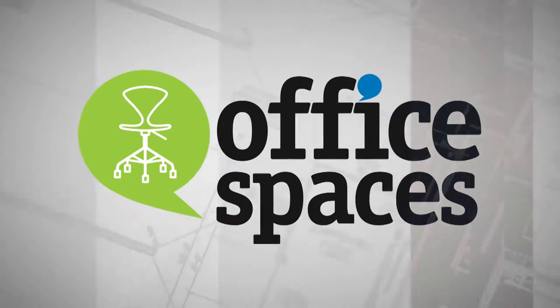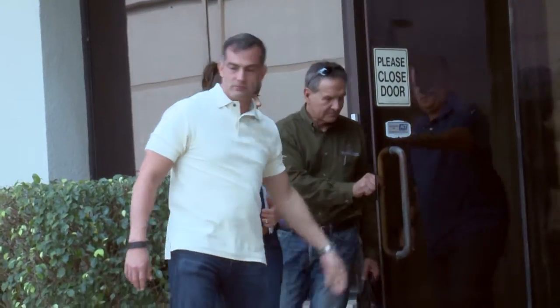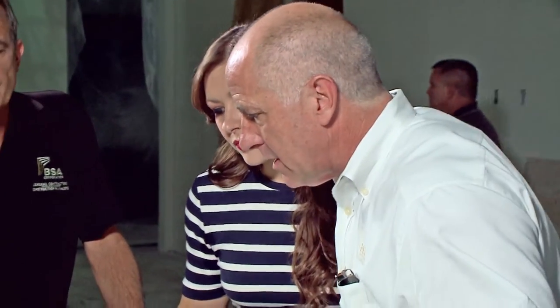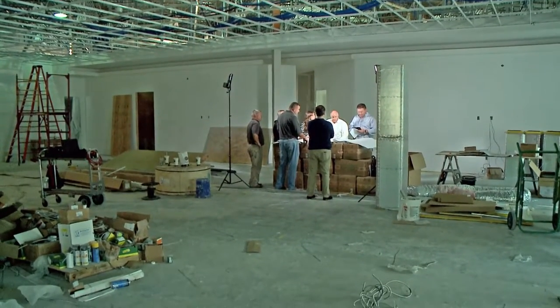The feature in our corporate renovation is about completed. Mark, the building owner and founder of the company, has given us what might be an unrealistic timeline. Bill Branning, our contractor, is looking at 120 days for completion. There's a significant difference there between what the owner wants and what our contractor thinks is possible.